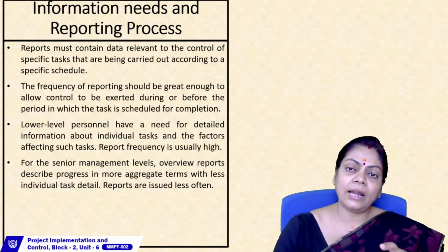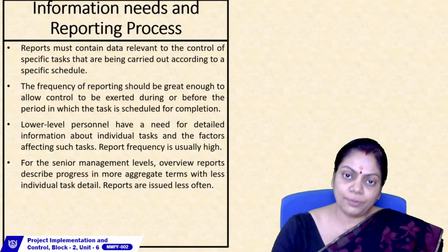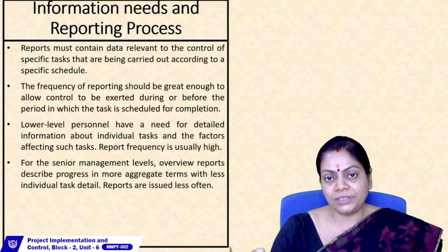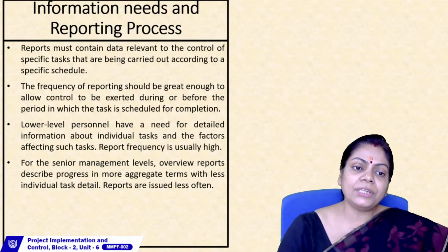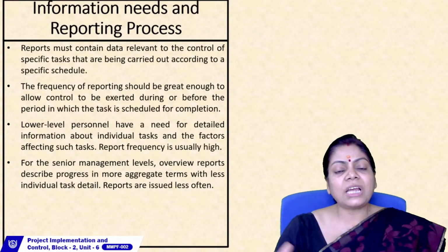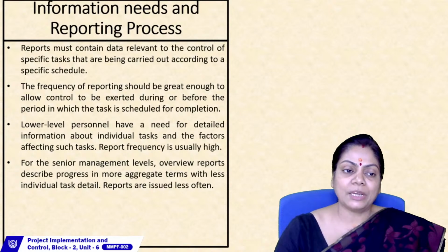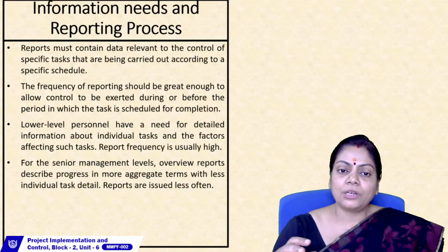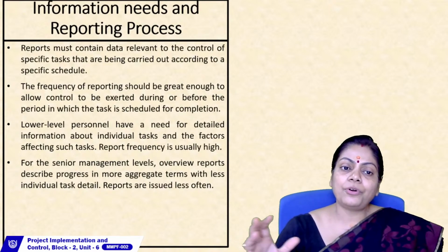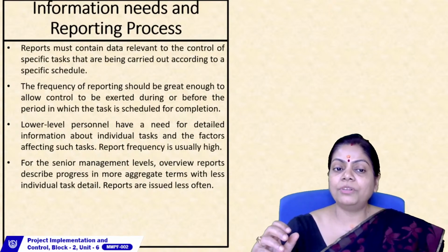that you are carrying out, according to a specific schedule. So there could be reports generated on a daily basis, on a monthly basis, on a quarterly basis. Now the point is, what kind of reporting is needed by what level of management. The frequency of the reporting should be enough to allow the control to be exerted during or before the completion of the particular task.